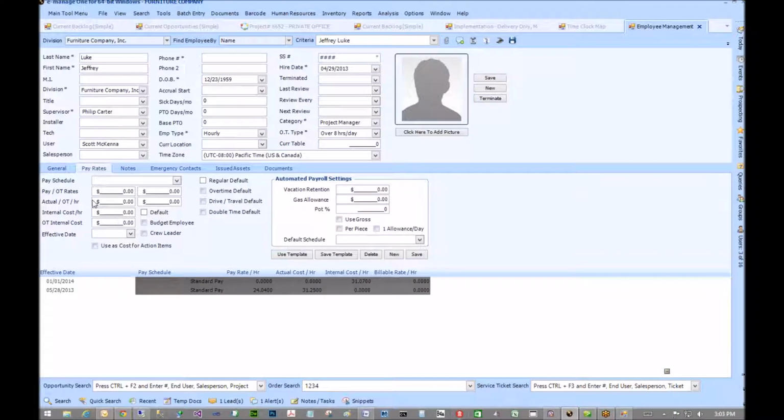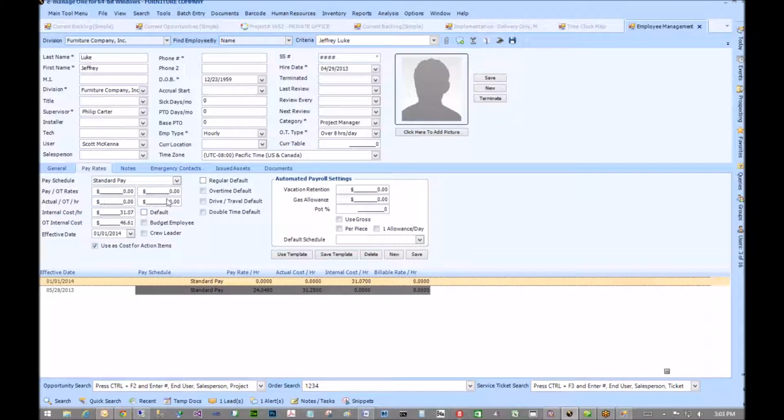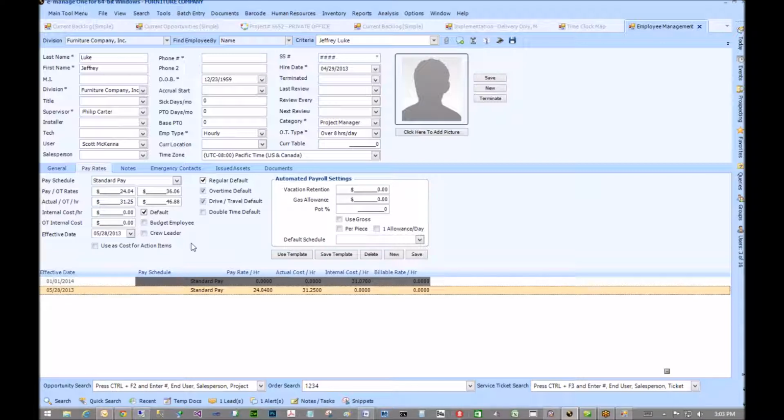And you determine what that number is here. We don't actually figure that out. But because you're going to know what their workers' comp rate is, and how much they get for vacation, all that stuff. Yeah. So like what our actual cost for our benefits and our taxes is, it's about 25%. It's a 25% burden on the employee. Yeah, for the cost for the job. And like I said, you can do a formula like that and do a percentage, or you can actually add up their stuff and get an actual number. It's up to you.